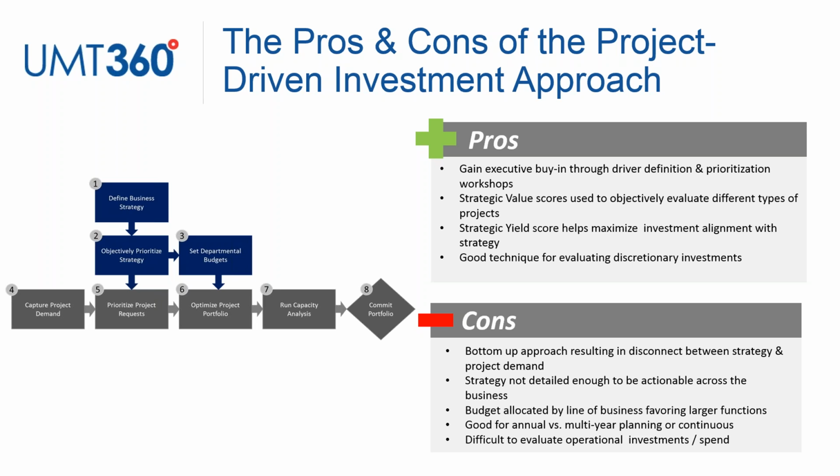And it is definitely very valuable within annual planning, but what's frustrated me for years is that when the portfolio then moves into execution, many organizations then adopt and fall back to other prioritization metrics to evaluate in-flight success, like financial metrics. But yield is equally important, as we discussed earlier, in the assessment and management of in-flight portfolios too, because if cost changes and value stays the same, yield will fall and act as a natural investment viability indicator. It's a strong technique as well for annual planning for sure, and the assessment of discretionary investment.